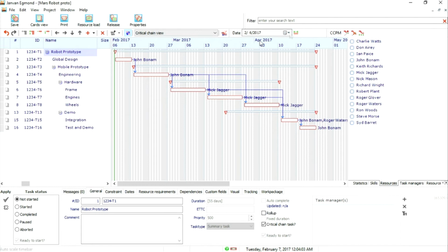So although most tasks will be completed in time, some tasks will be late. Despite the safety reserves, buffer management helps you to better complete your projects in time when some tasks need more time than their safe estimate. Buffer management makes it possible that people who don't need all their safety reserve transfer it to people who need more time to complete their tasks in order to complete the project in time.